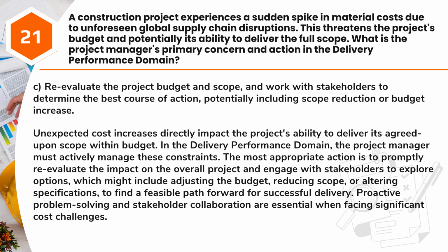The most appropriate action is to promptly re-evaluate the impact on the overall project and engage with stakeholders to explore options, which might include adjusting the budget, reducing scope, or altering specifications, to find a feasible path forward for successful delivery. Proactive problem-solving and stakeholder collaboration are essential when facing significant cost challenges.